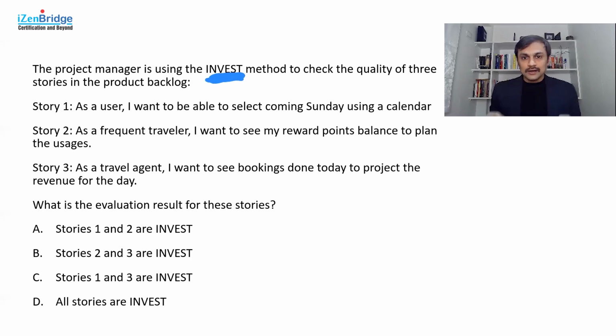So you can say, how do I identify this user story is good to go in a given iteration, because you want to pick it, it should be small enough and all. So what is this INVEST? I stands for independent, which means that the story should be, as far as possible, independent. It can be evaluated end to end by just looking at this user story. Sometimes you may not have an independent user story, but you should always aspire to have independent user stories.